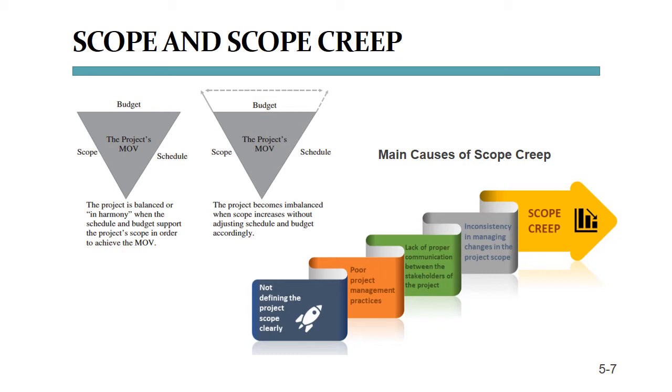A change request is an addition to the project charter and modifies parts of the project charter. So here, if scope is increased, it modifies the scope statement as it is recorded in the project charter. This is why any changes to scope and to budget and to schedule will have to be authorized by the project sponsor first before they can be implemented.